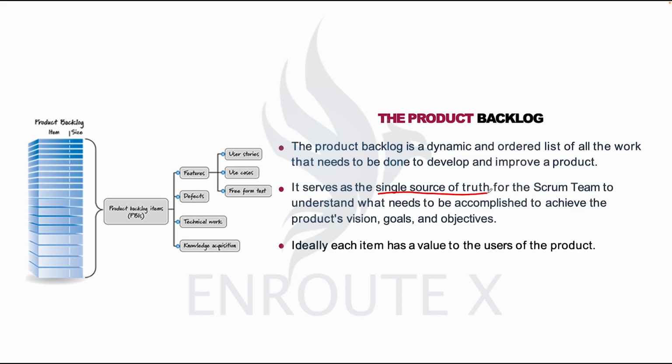When you need to create your own stories yourself, your own product backlog, right? At the start of your sprint, on the first sprint, all the members of the team would need to come together and populate the first product backlog. Then from there, each product owner would need to manage the product backlog and be responsible for all the stories in the product backlog.